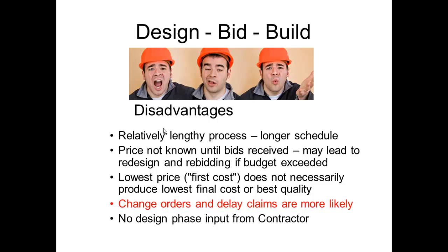Sometimes we also refer to this as value engineering. And I should put that in the slideshow, because in the construction world, you're going to hear the word value engineering. Value engineering is basically taking the project, sitting down with the low bidder and saying, what can we do to get this project in budget for the amount of money we have without having to go back out to bid.